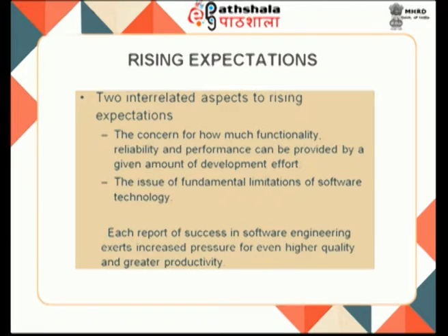As the main cost of producing software is the manpower employed, the cost of developing software is generally measured in terms of person months of effort spent in the development, and productivity is frequently measured in the industry in terms of LOC per person month.